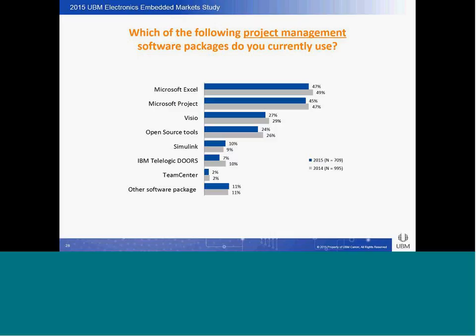Now, embedded system, you cannot forget about the project management aspects of doing a project. When we teach students how to develop embedded systems, we actually have them identify these that they will follow for a relatively large project. In other words, what are major functionalities that you will develop, and estimate each one of those will take to complete: high level design, a low level design, implement, and then test.